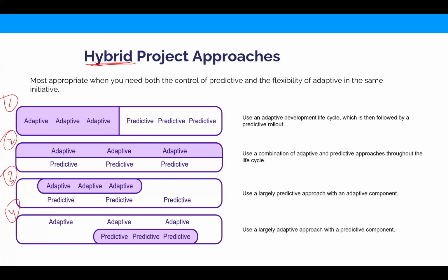So that's why we want to use predictive. There are other parts of the project for which the requirement is highly volatile. We would experiment, evolve that. So we want to use Agile for that. Do you appreciate that? A single project can employ multiple life cycles for multiple parts. That's where adaptive or hybrid is a good idea.